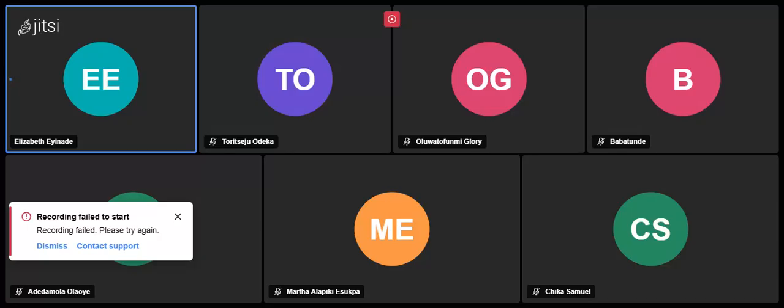It should be in that order that you want your product features to be worked on. So when you prioritize, then you now go to your sprints. When you're using Scrum, sprints are, okay, you want your engineers to work on a particular feature now, or you want to keep track of their tasks here. So sprints are normally from 1 week to 4 weeks.